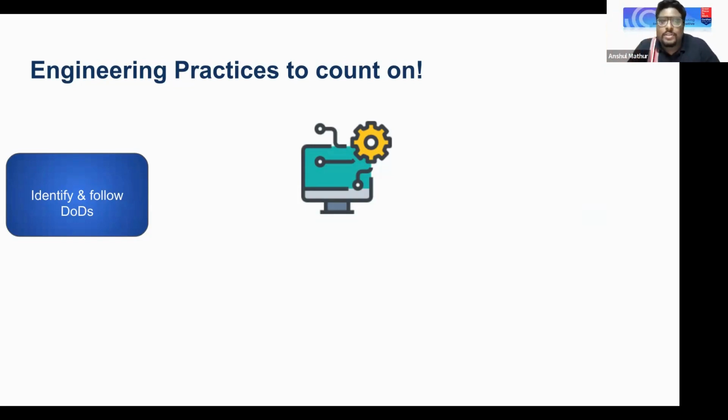So if your user story is picked up, a definition of done should have a checklist where you're talking about making sure that the code is behind your feature flags, if the code is dependent on some other microservices as well, you have enough tests, or your existing tests are getting updated or not. Are you communicating any contract changes, if at all? Are your logs getting added, if you're adding more logs with your PRs, and stuff like that.